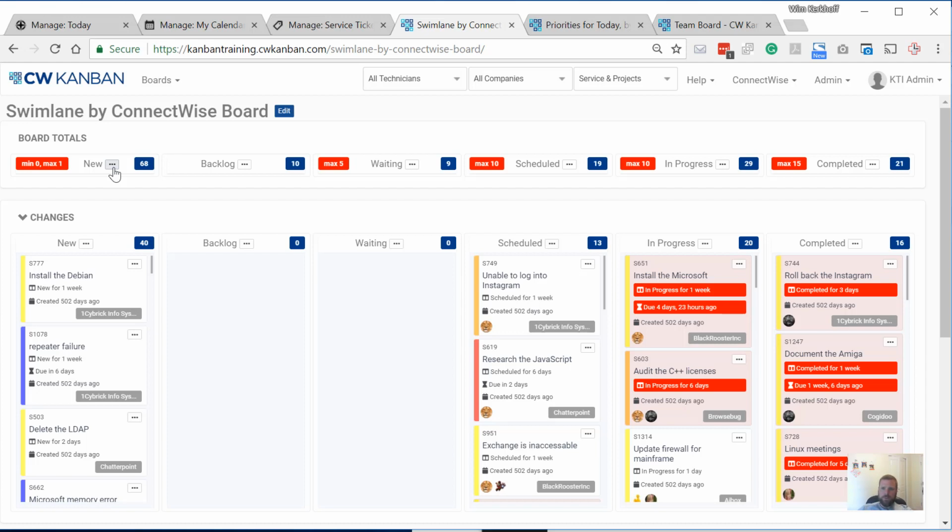So the team works together to focus on getting more work through the system. The best way to get more water out of a pipe is not to pour more in to increase the pressure, but let the current water flow out the other end by removing blockages, removing waste, and increasing the flow. So the work moves, as I mentioned, from left to right, but the team should look from right to left to see what can be moved forward first. When they're ready to pull something from the previous column, they should grab from the top of the column if possible, or something that has already been started or neglected.